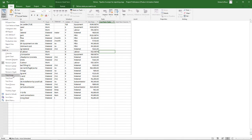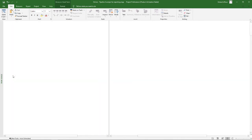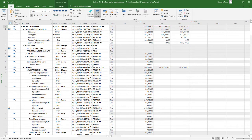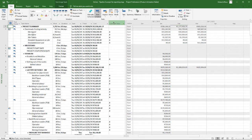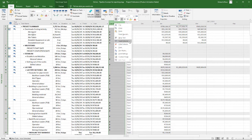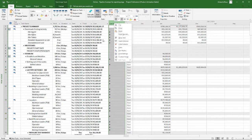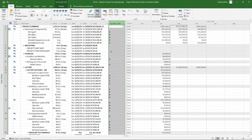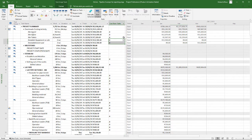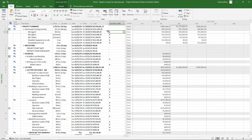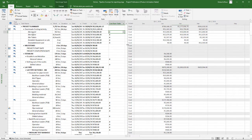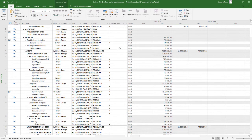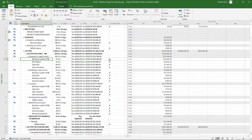So if I go to the task usage view over here, you can open up the cost rate table field. So I've inserted that cost rate table field and now you'll see it gives me the option of either having an A or B or C type rate.